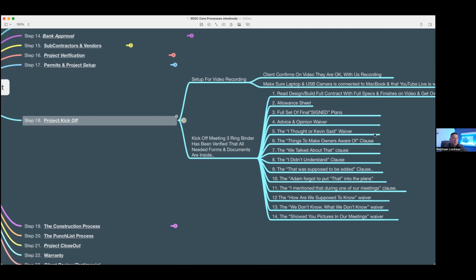And we have a change order consideration fee. There are all these little things that we've done, and we let the owners know up front of that too, because we don't like change orders. You've got to remember, we're about being efficient. We're charging a good price on the front end. We're not trying to be the cheapest. We're charging a good price so we can make good profit, but also deliver excellent service and be efficient. But we do know in custom building, that's going to happen. What you don't want is a builder who gives you a cheap price knowing they're going to make a killing in change orders. That's the industry, right?